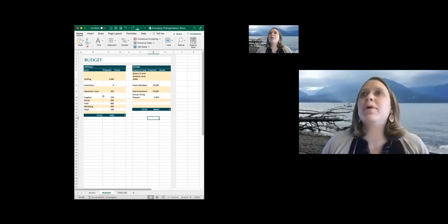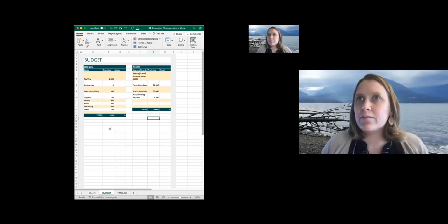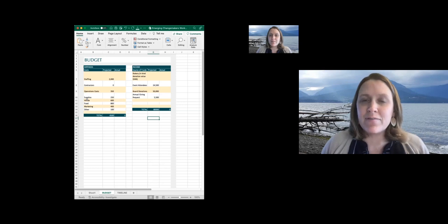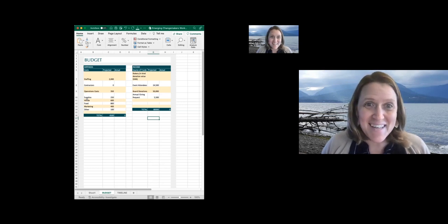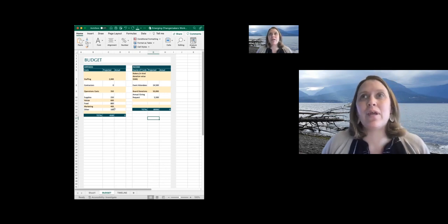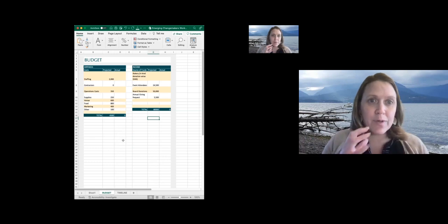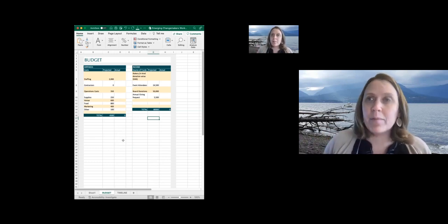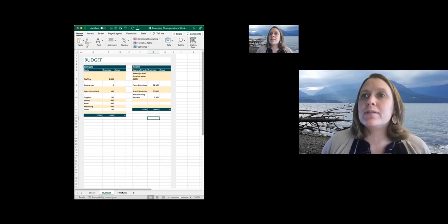And then there'll be a simple budget table that you can modify for yourself just to get a handle on what the project costs are, what the expected income might be. You know, if we start to do research and we realize that the venue is going to cost us $8,000, that's going to really shift what we might be able to bring in. We might have to get really creative around that budget point if that were to become a challenge. So doing some of that initial budgeting and then being able to capture the actuals later too, if we're new to event planning, might help inform future work plans.